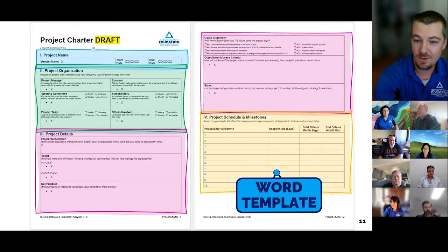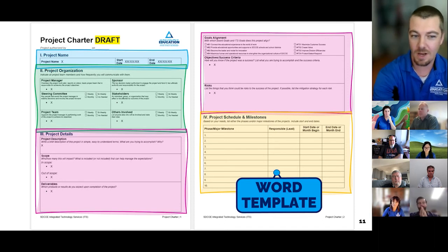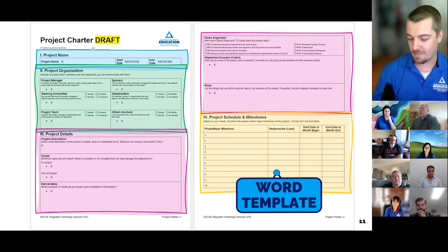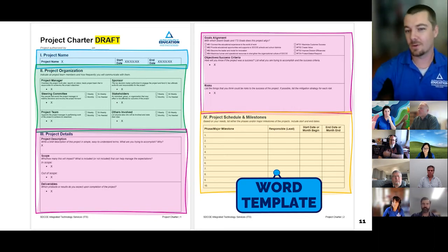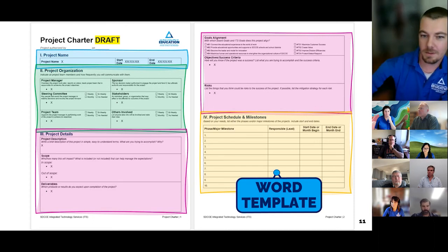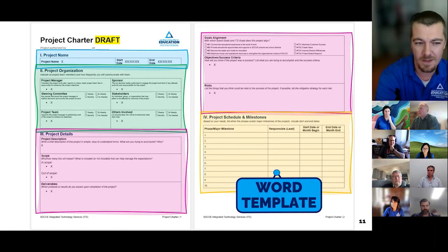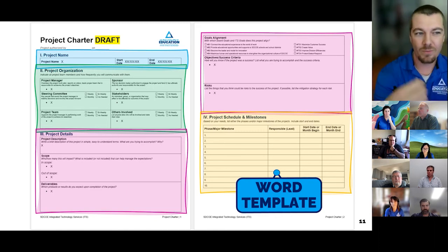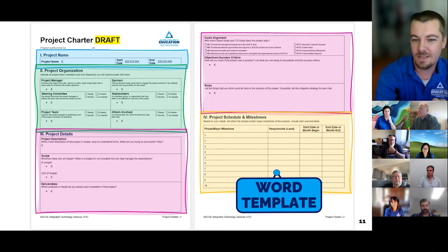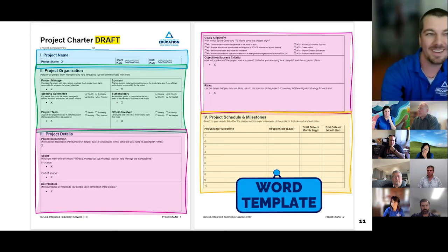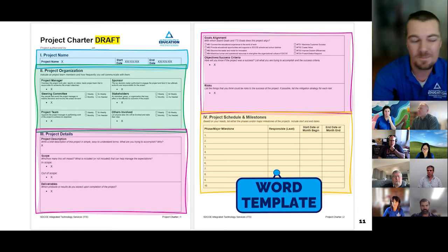Then we've got objectives and success criteria. So this is how do you know the project's successful? And try to be specific and don't get so caught up on the method, if that makes sense. So for example, our goal might not be to install firewalls or rather install a bigger network system. Our ultimate goal would be expand the network throughput. Those are two different goals technically, if that makes sense. It's really the realistic end result, objectives and success.